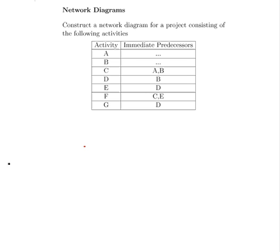So let's first off write our first node here. I'm going to call this node 1. And A and B have no predecessors, they have no dependencies. So I'm going to straight away put in activity A and activity B.